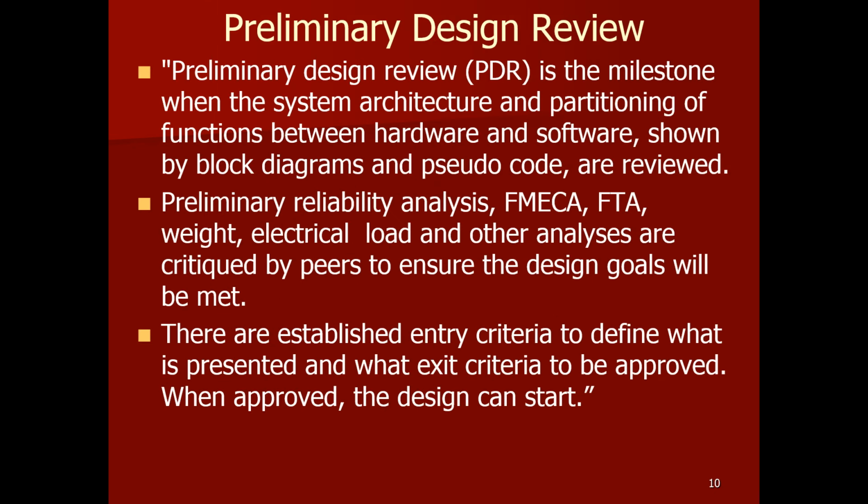Okay, we're going to talk about a preliminary design review, a PDR. Preliminary design review is the milestone when system architecture and partitioning of functions between hardware and software, maybe in your case shown by block diagrams and pseudocode, are reviewed. We're basically reviewing the connections and the subdesigns and functions and making sure they all work right. Preliminary reliability analysis and all these other things are critiqued by peers to ensure that the design goals are met.